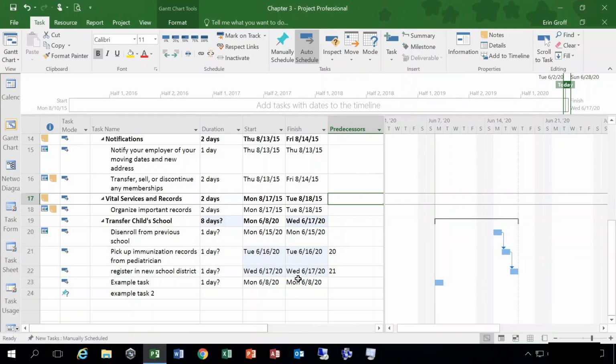You may be familiar with the concept of deadlines in a variety of contexts, but in Microsoft Project, you can set a deadline on a task for the purpose of tracking how close the task finishes to the deadline date. Setting a deadline on a task does not affect the automatic scheduling of a task. It simply gives you a visual indicator that you can use to monitor progress.